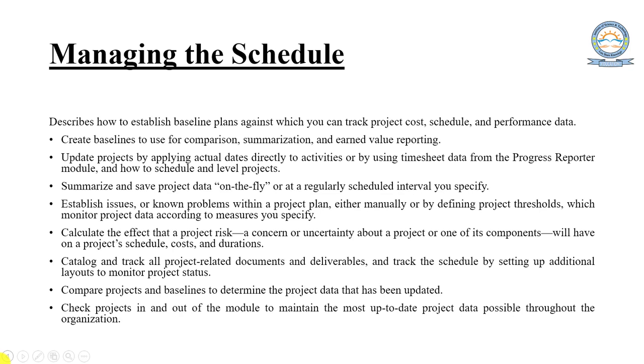The next is to manage the schedule. Manage the schedule describes how to establish baseline plans against which you can track project cost, schedule, and performance data. First of all, create a baseline to use for comparison, summarization, and earned value reporting. Update the project by applying actual dates directly to activities or by using timesheet data from the progress reporter module, and how to schedule and level the project.